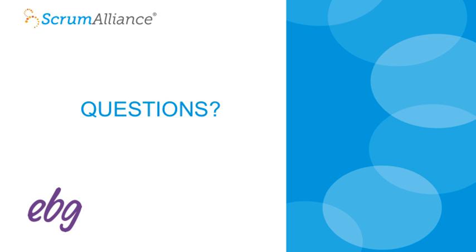It's going to vary by team and whether you're exploring and evaluating, confirming one item or many items. But if you're talking about a refinement conversation and you're doing this on a regular basis, so you're in a rhythm of refinement, which of course we want to be because we're constantly getting items ready for a sprint and 2 sprints forward, these conversations are going to be, for multiple items, anywhere from 20 minutes to maybe an hour.